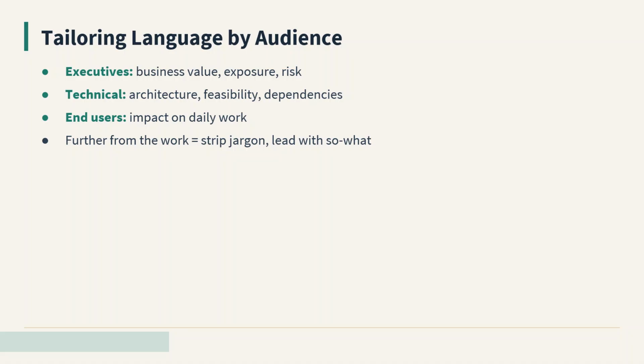The rule of thumb is that the further the stakeholder is from the day-to-day of the project, the more you strip jargon and lead with the so what. A senior executive should be able to read your 2-paragraph summary and know exactly whether to worry.